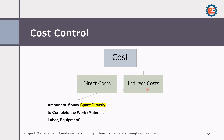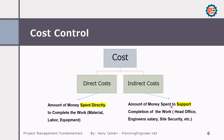Indirect costs are costs that we cannot segregate or assign to a specific activity. For example, the amount of money spent to support completion of the work — like the head office, engineering salary, etc. You cannot assign this cost to a specific activity in your project, that's why we call them indirect costs, and they will be distributed over all the projects.